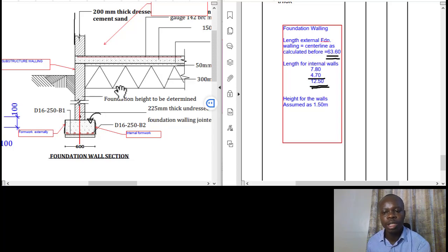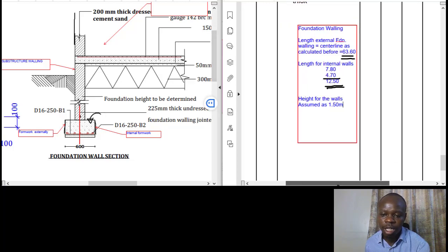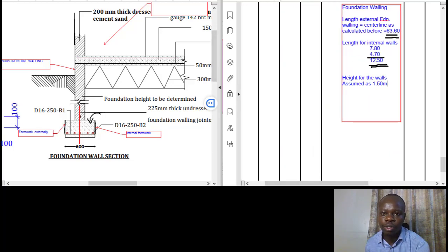Well, the rule told us that we need to measure our wall in square meters, that is getting the length and also getting the height. We've already got both of them, and therefore the next item remaining is for us to enter the dimensions. So straight on we move and add what we need to add in entering our dimensions here. Let's see what that is coming to.